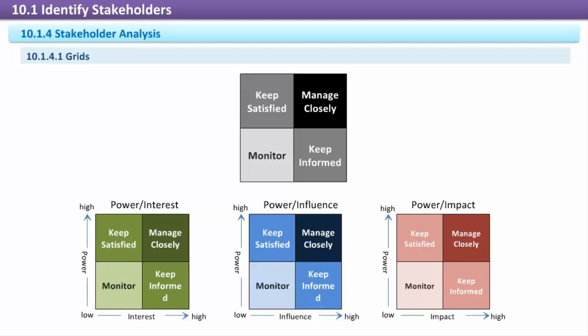partnership or collaborative relationship. In the upper left quadrant are stakeholders who need occasional engagement with the project and project manager. The project manager needs to keep an open and regular dialogue with the stakeholders in the lower right quadrant. And those in the lower left quadrant need to receive occasional follow-up and information about the project, but the project manager doesn't want to overwhelm them with communication.